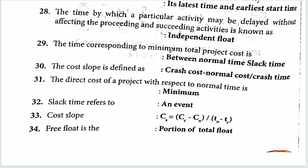The time corresponding to minimum total project cost is between normal time and crash time. The cost slope formula is: (Crash Cost − Normal Cost) / (Normal Time − Crash Time), i.e., (CC − CN) / (TN − TC), where CC is crash cost, CN is normal cost, TN is normal time, and TC is crash time.